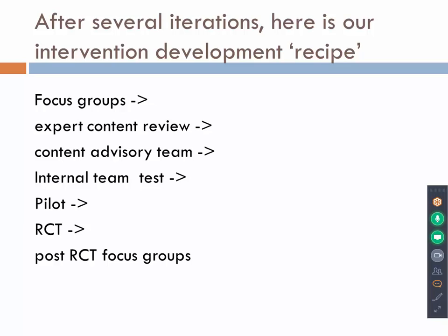So pilot it, and don't just pilot the first couple weeks, because we've done that too. Pilot the entire thing, because there's probably something in week 5 that's lurking that you forgot that you want to test because you want to make sure it works before you have your RCT folks going through. So pilot the entire thing. And then do the RCT, and then talk to the folks in the RCT about what the experience was so that you can improve it hopefully for the next time around.